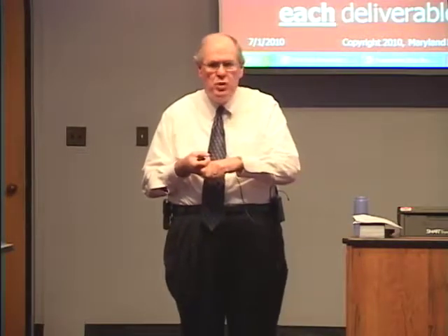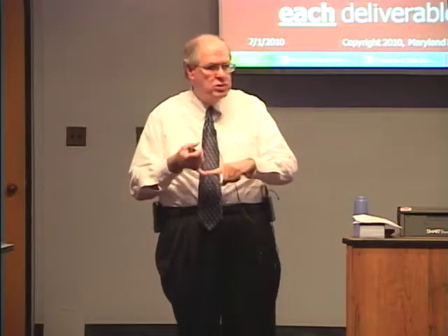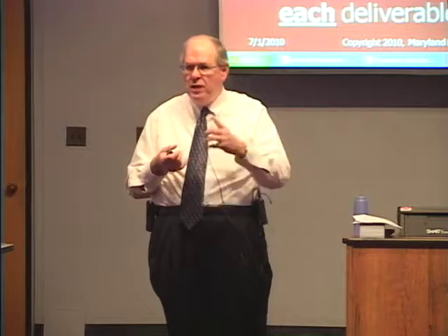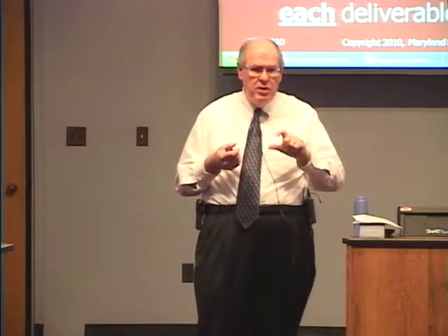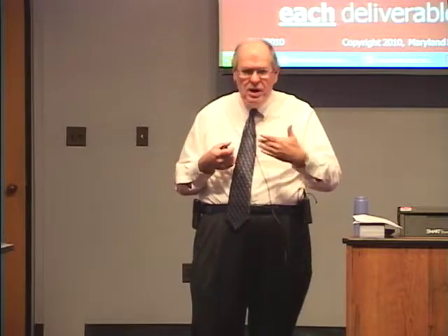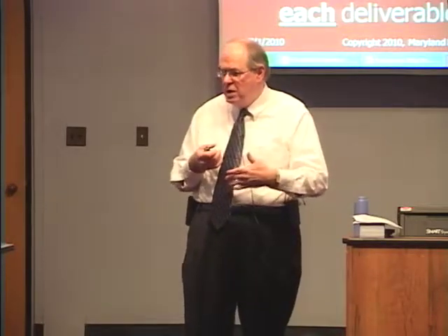And that helps you 2 ways. Number one, it helps you focus on what your deliverables are. If you have to do a checklist to identify the deliverables, then obviously you'll take great effort to identify the deliverables so that you can put them in a checklist. And it's kind of like a check and balance.